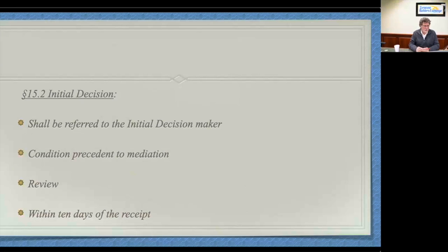In my luncheon chat today at the client's offices, I talked about a case in Scarsdale where one of my GCs had something in the area of $4 million that they hadn't gotten paid on a high-end assisted living facility project. So we had to sue. And let's say 2.8 or so was extras, 1.2 was other base contract and retainage maybe, or it could have been the other way around. It doesn't matter. One of the defenses raised by the developer on that job was that the GC had not asked for an initial decision. And truth be told, they hadn't. It was a long time after all that happened that we got involved, right? Because nobody calls the lawyer until it's way too late.